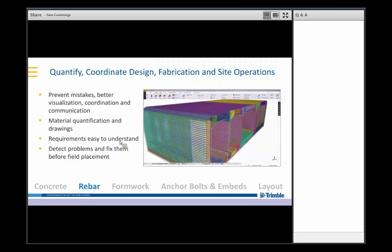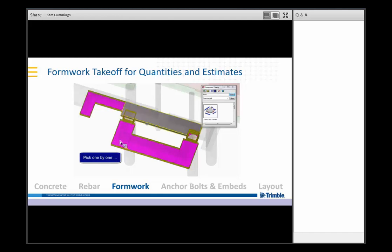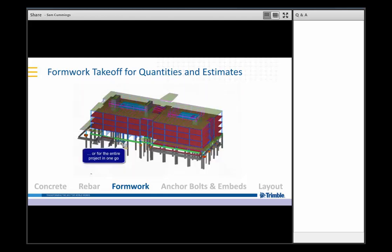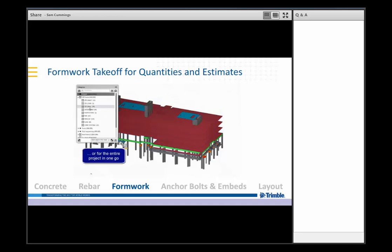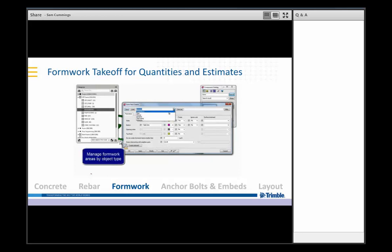Now we actually have 3D models, it's very easy to again take that geometry and take it even further. So when working out contact area or formwork and shuttering, if you actually use a model, you don't have to trace over this 2D information anymore, or punch profiles and depths and information into Excel sheets so that it generates that for you. It's actually possible to use the model geometry. And using this geometry in the model means that where concrete crosses, you're actually able to deduct the required amount of surface area so that you can make sure your takeoffs are perfectly accurate.